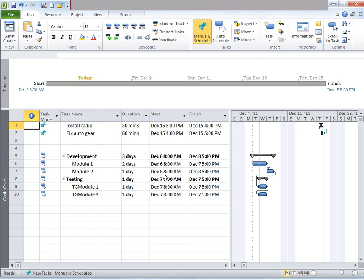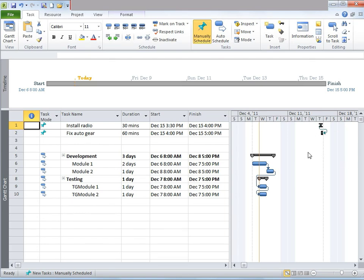The Gantt Chart is used to view tasks, create dependencies between tasks through links, and see how your project is progressing over time. The Gantt Chart view consists of two parts: a table on the left-hand side and a bar chart on the right-hand side. The bar chart includes a timescale band across the top that denotes units of time, and the bars graphically represent tasks in terms of start and finish date, duration, and status. The Gantt Chart is a popular and widely understood representation of project information throughout the project management world.